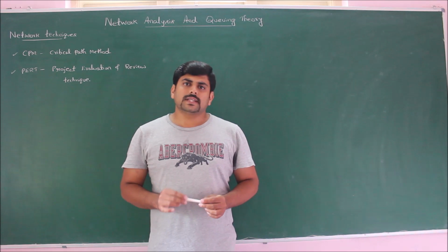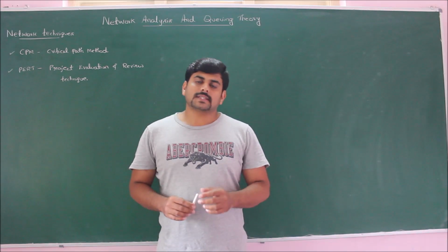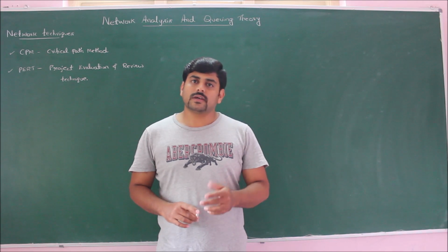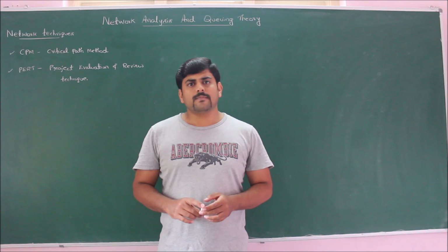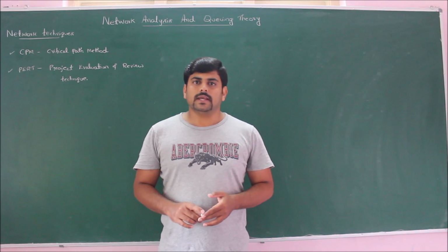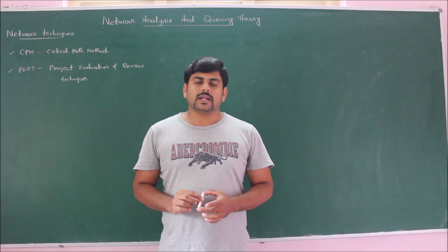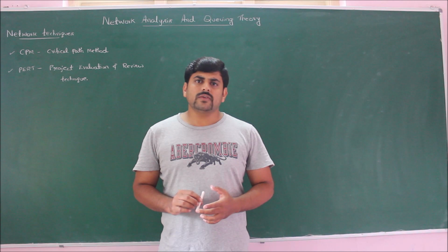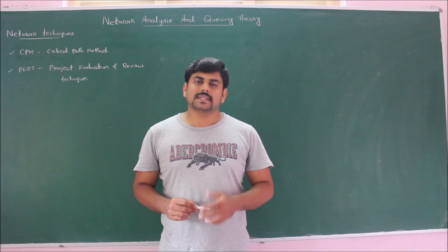Coming to the network, why is it required in project management? Let us consider an example of construction of a building. If I want to construct the wall of a building, before that I should construct the foundation of that building. Without constructing the foundation, I cannot construct the wall of that building. And also the construction of a building involves many activities such as procuring the raw materials, arranging the labors, etc.